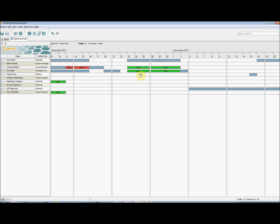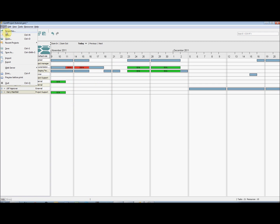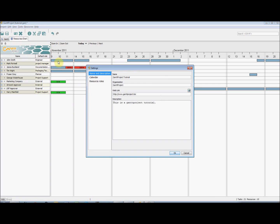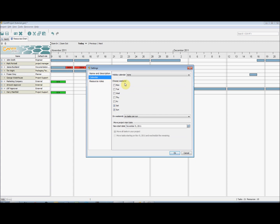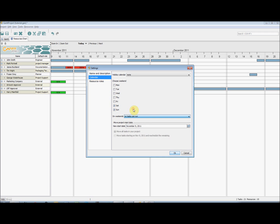You may also observe that weekends are not set as working days. This can be changed by going to Project, Properties, and then selecting Calendar on the left hand side. And you can choose whether weekends are worked on or not. And you can also load a holiday calendar as well.